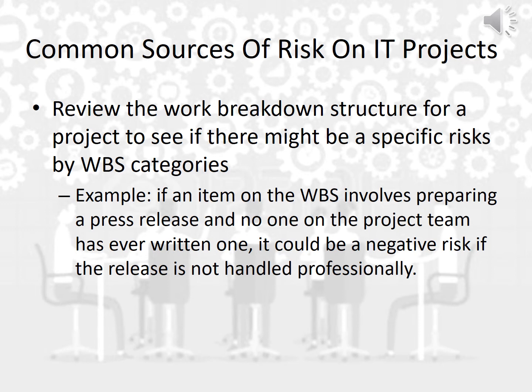In fact, a risk breakdown structure is a useful tool to help project managers consider potential risks in different categories, and it works similar in form to the work breakdown structure, or WBS. As I will show you in the next slide, there is an example showing you the structure that can be handled in such a situation.